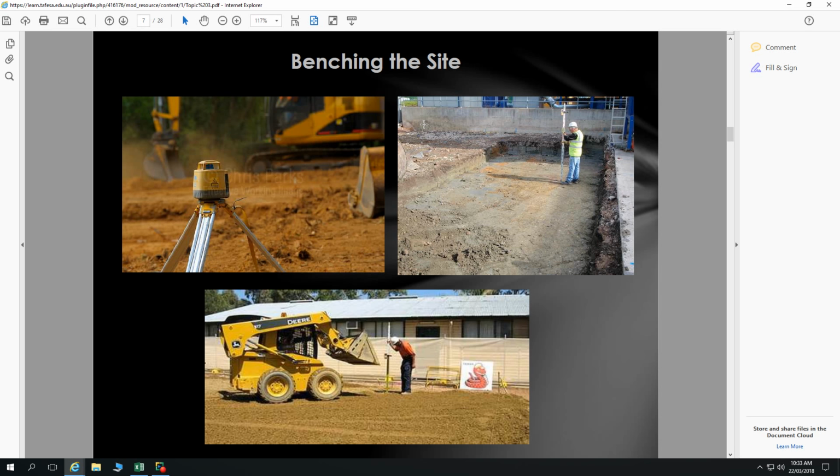Yes, yeah. So any adjoining buildings that may have structural issues or ramifications as a result of our work on the site. We covered dilapidation reports last week, and if we're going to be working in a fashion that is at risk of doing any disruption to adjoining buildings, we want to get a dilapidation report in place before we start. And then we'll have to ensure that those buildings are protected either by shoring up or prevention of machinery crashing into them, etc. on the site.